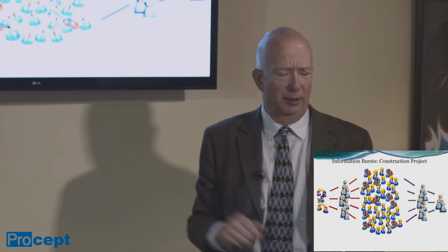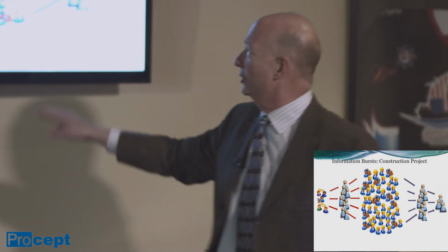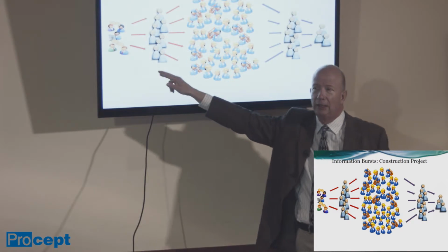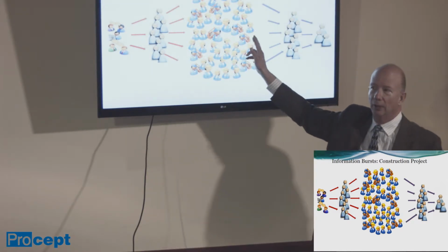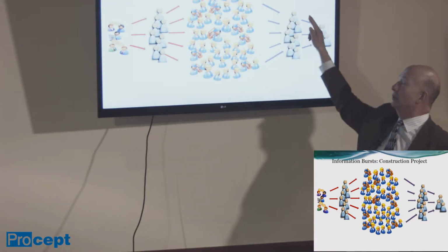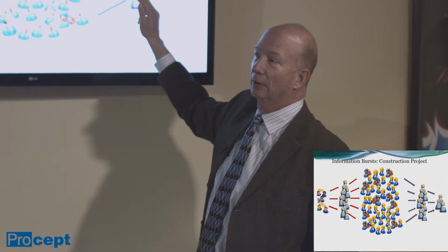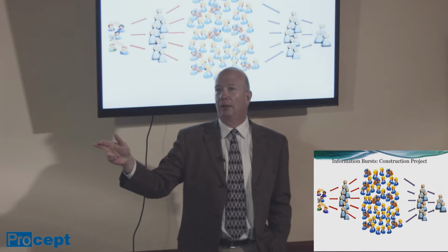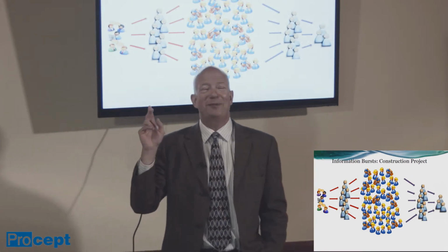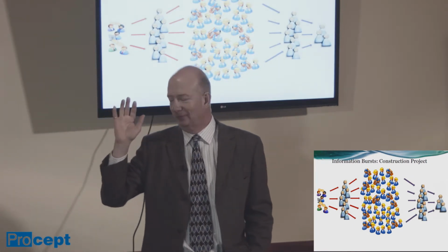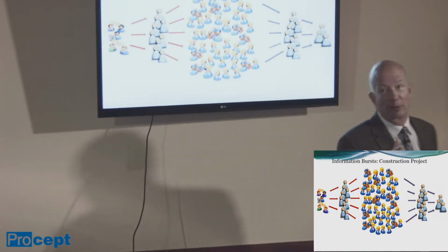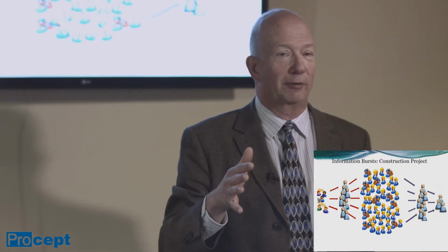We could have had equipment that was specified 2-3 years in advance by these guys to the best of their ability, that's discontinued, and by the time you get over to here, it's the next model over. Any healthcare people in here? Yeah, if you have to buy an MRI, or I worked on a couple of cancer care projects, a linear accelerator.